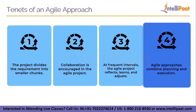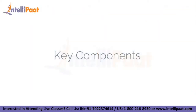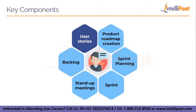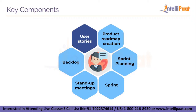Agile project management primarily has six key components. The first is user stories. Simply put, a user story is a high-level description of a task. It gives just enough information for the team to come up with a credible estimate of the time it will take to complete the request. This brief, straightforward explanation is written from the user's point of view.